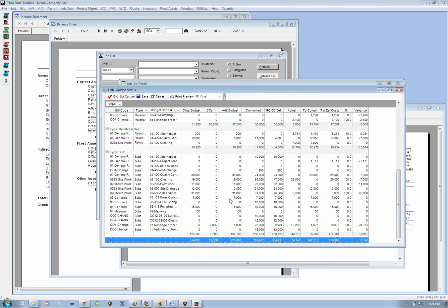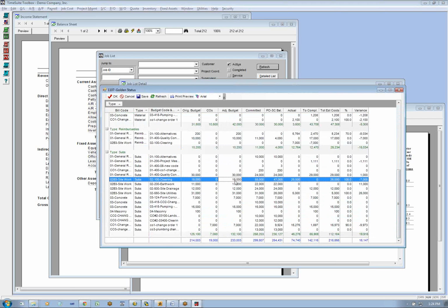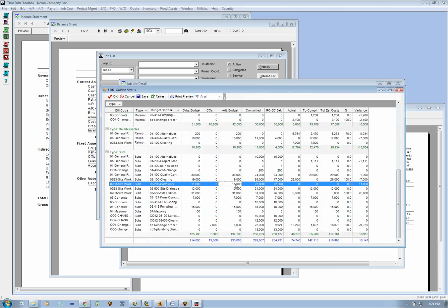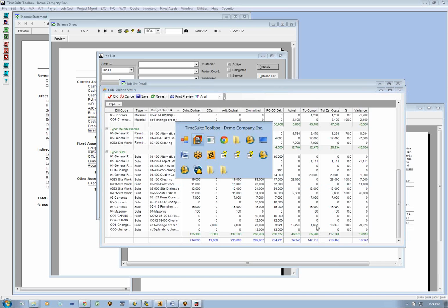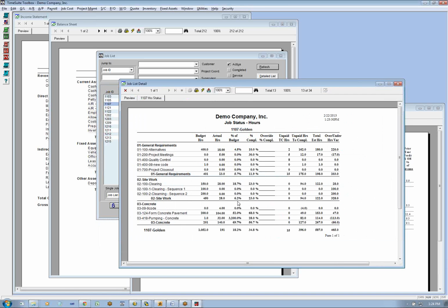One thing that I asked somebody yesterday, how do you track your jobs? How do you make adjustments to your jobs on your summary contracts? And she said, we change our budget, which is a terrible thing to do because you want to preserve your budget so you can compare it with what you actually did and have that variance analysis. So budget actual variance becomes less useful if you're adjusting your budget to drive your summary contracts.